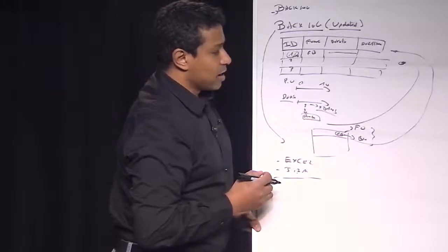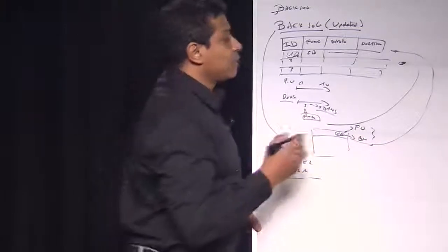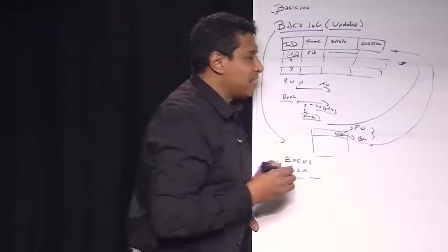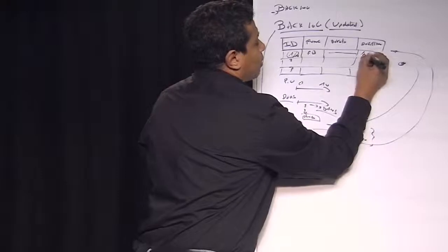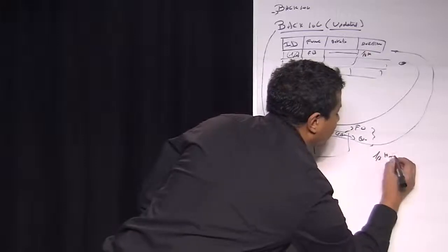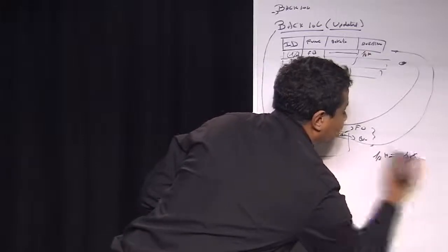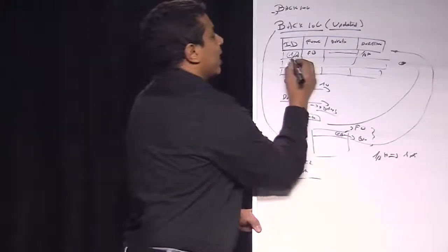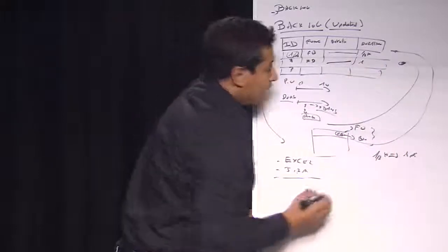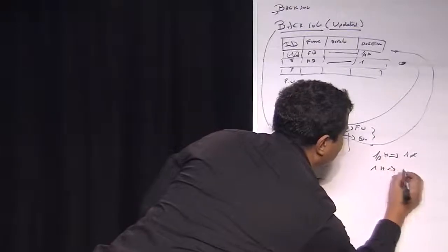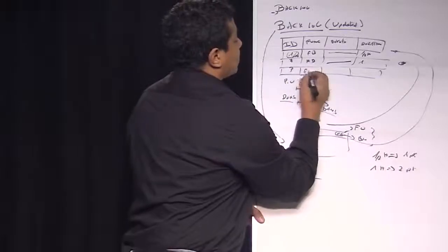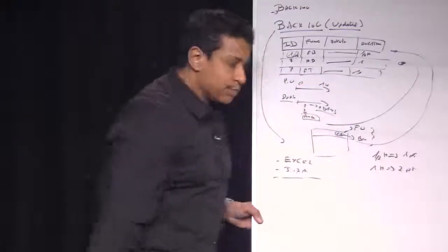So, what else can we say about the backlog? The backlog can be extended to another thing that we may need later. A few moments ago, I said that FB will take half an hour. You remember? Half an hour. Let's say that half an hour is equal to 1 point. Okay? Let's say my header is second here, say an hour. So 1 hour makes 2 points. Correct? Right. Let's say that the footer is 1, 2. It makes 3 points.